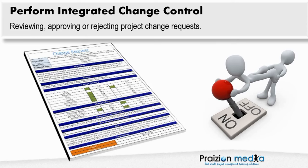For your exam, I want you to think about change requests. Change requests need to be formally documented, reviewed, and they are approved or rejected. Depending on the project, they could be rejected by the project manager or by the sponsor, depending on how the organization does business. But on the exam, the question will make it very clear what the PMI is looking for. In most circumstances, think about change requests being reviewed by a body of people known as the change control board.